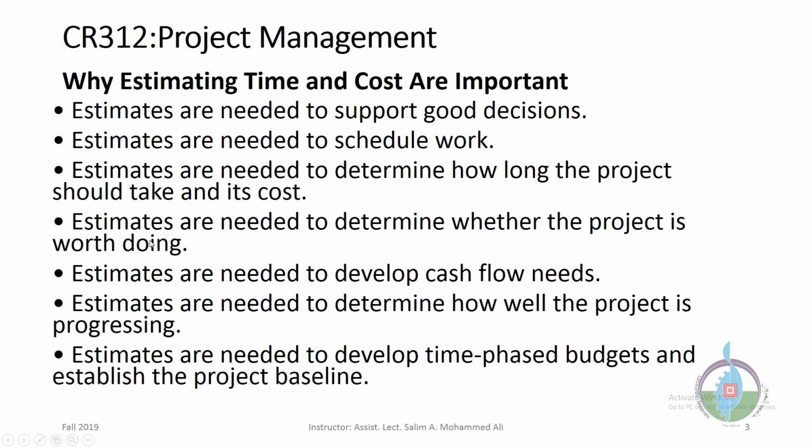Also, estimates are needed to determine whether the project is worth doing, the same reason. Estimates are needed to develop cash flow needs, because we all know that most projects need cash flow from banks due to a loan or something else. Banks require project managers to have estimates of how much cash they need for each week or each month or each year of their project. So making a list of estimates is very important to get cash flow from banks.